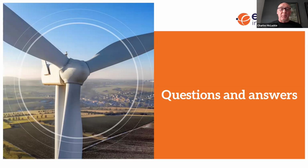I think again this comes down to planning and the practicalities of the application. I don't think this is actually mentioned in here, but there was a suggestion that it would be best if you could apply an individual task to each turbine and lay out that duration. Another consideration may be whether TAS is suitable if the project is going to extend beyond 2 or 3 days and you want that machine back in operation.